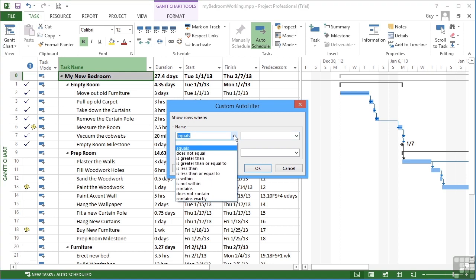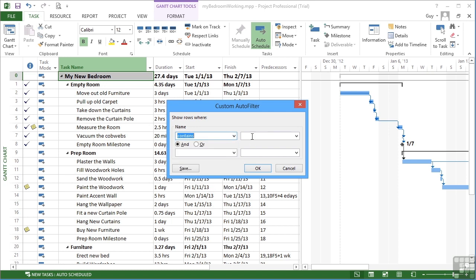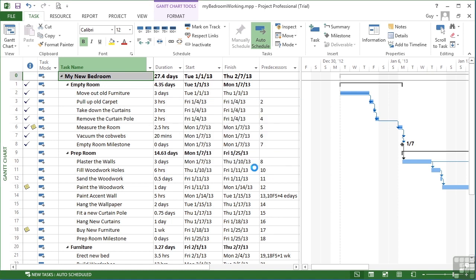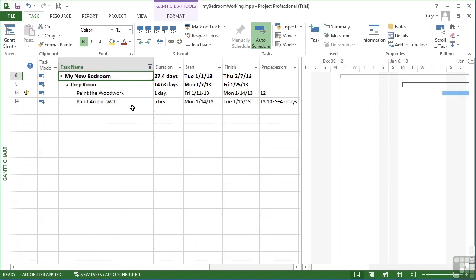Here you can choose any of the normal comparisons: is equal, is not equal, greater than, greater than equal to, less than, less than equal to, is within, is not within, contains, does not contain or contains exactly. If we were looking for tasks that contains the word paint, then OK, you'll see we get given all the tasks that contain the word paint and there are only two: paint the woodwork and paint the accent wall.